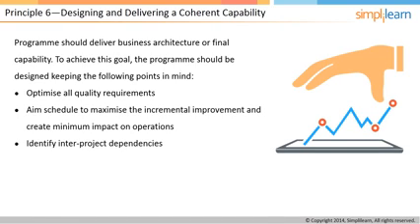A program should ensure that the project scope and outputs are carefully delineated. All the inter-project dependencies should be identified, and there should be clear understanding of program versus project responsibilities. A program should not take over the project management responsibilities. Projects should have well-defined boundaries in which they are free to operate as long as they deliver the promised output.